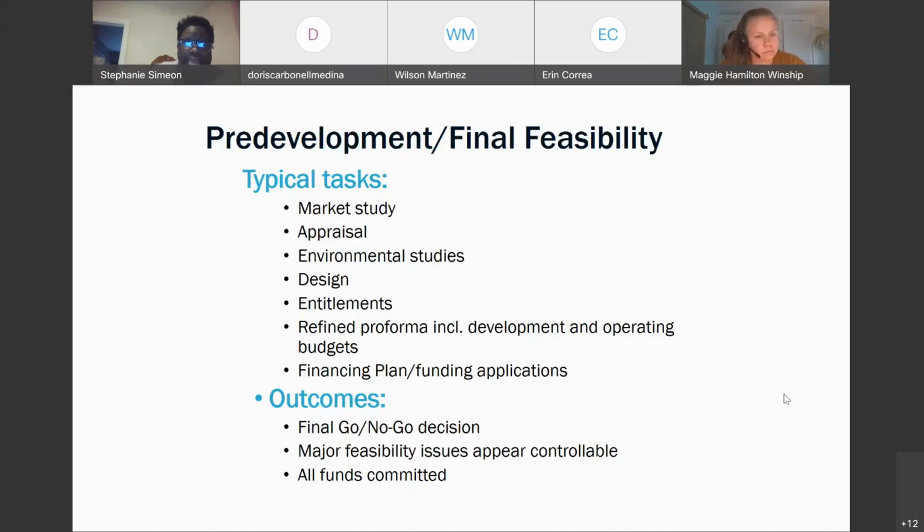And if your appraisal comes back saying, especially if you're doing homeownership projects, that properties only go for 50,000, and you know that it's sat vacant for 20, 30 years, you already know you're going to need a significant deep subsidy for that project to happen. For many people, this is where they stop. The numbers, unfortunately, they don't lie. So this is a go, no go.